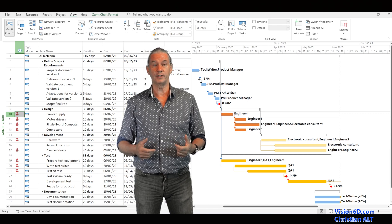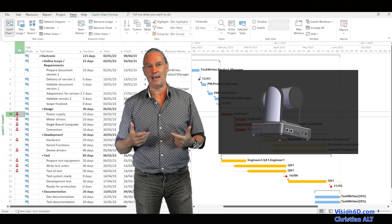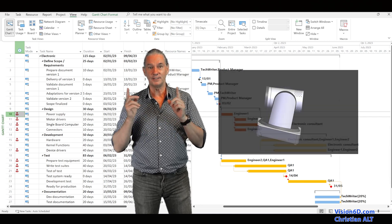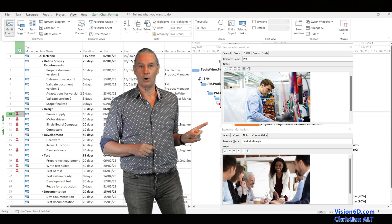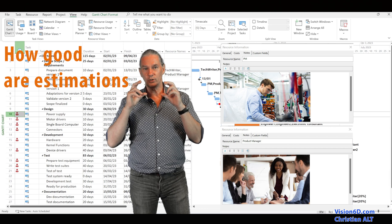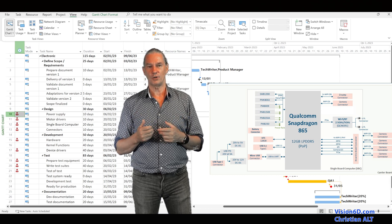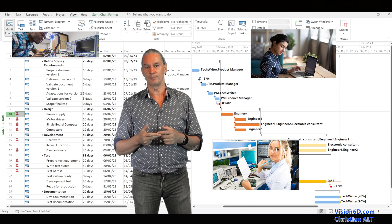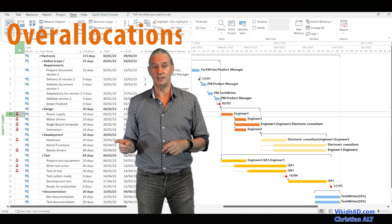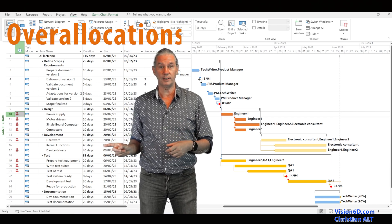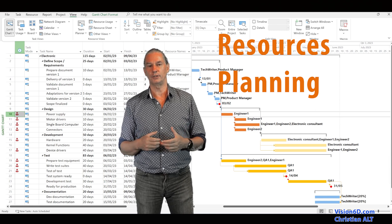In this case, the project was the conception of the electronic part of a PTZ camera — PTZ standing for Pan, Tilt and Zoom. The project manager and the product owner went together to review the different tasks they needed. Since it was electronic development, they said we need engineers, designers, developers and testers. They evaluated the different tasks and assigned those resources without entering into the details, saying those people will handle the development.